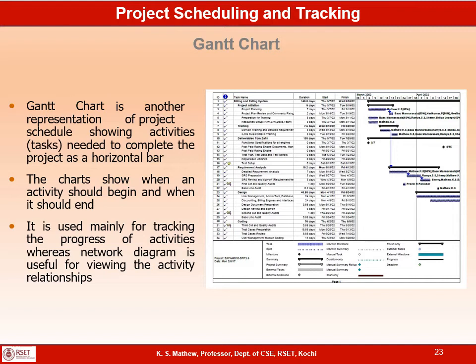So you can see the activities detailed requirement analysis and the SRS preparation are connected. So the SRS preparation can be started only after detailed requirement analysis, which is a sequential activity, represented using the finish to start relationship.